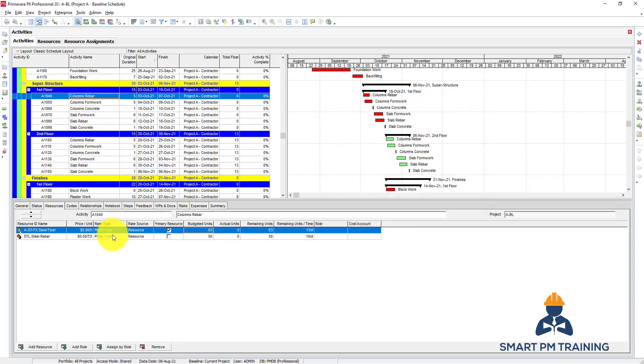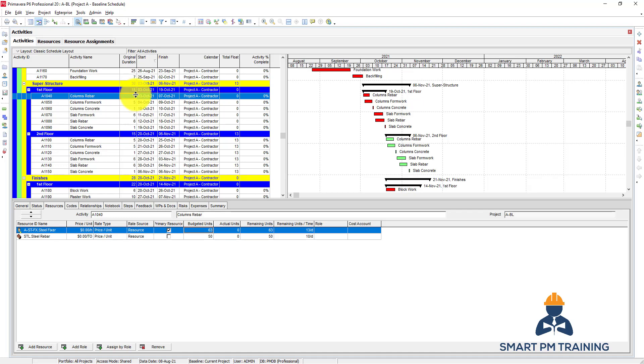For a labor, budget units is budgeted hours. Let's say I want to have 10 steel fixers. So 10 steel fixers are working 10 hours per day - this means 100 hours per day worth of labor work. And I have five days of work, so this means the budget units, overall hours, are 500.